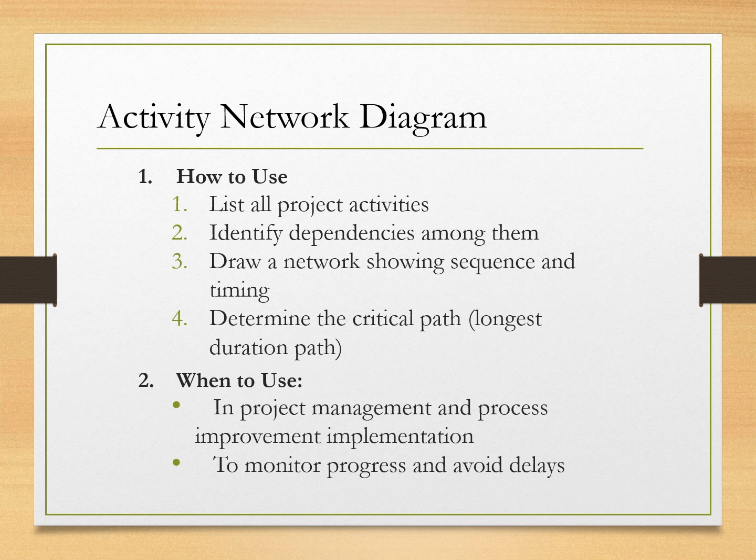Finally, find the critical path, the longest chain of dependent tasks that determines our project's total duration. Tasks on this path have zero slack, so any delay there could delay the whole project. Whether we are planning a wedding or launching a new product, this tool helps us visualize dependencies, stay on schedule, and manage project time effectively.